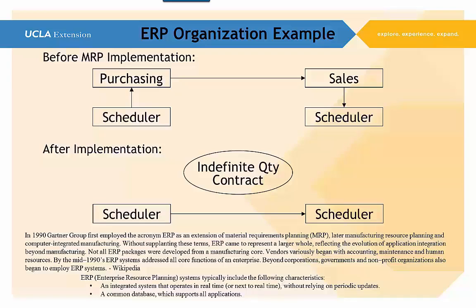And the scheduler is really like the hands-on person in those organizations. Once you take your purchase request and sign off on it as a project manager, you take it to purchasing and you put it in the inbox or whatever they do, and then they start looking at them. It's a scheduler that gets it and then starts scheduling it and gets set up with buyers, and they determine whether or not they got to do competitive bidding or they can just go to an open source procurement activity.